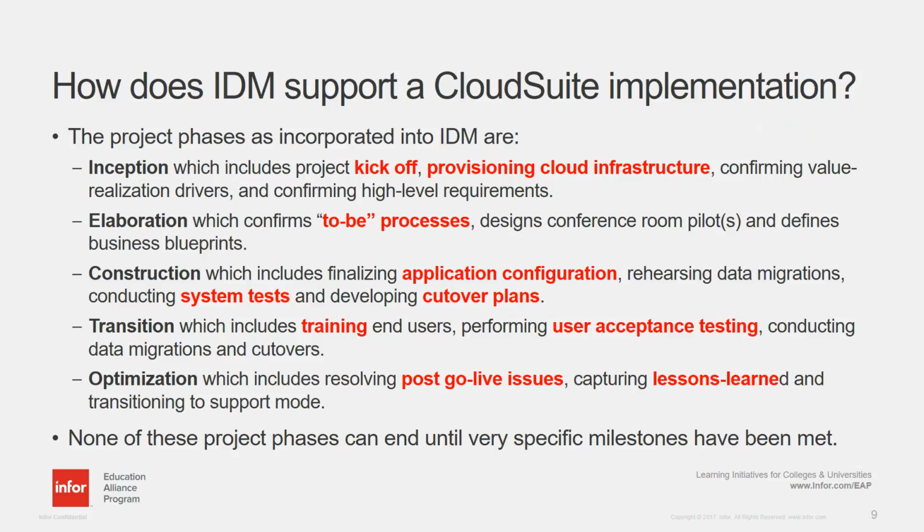Then there's the construction phase. You have application configuration, you have system testing, cutover planning. The transition phase then will include training for the end users, and the user acceptance testing, and the actual cutover will happen during the transition phase.